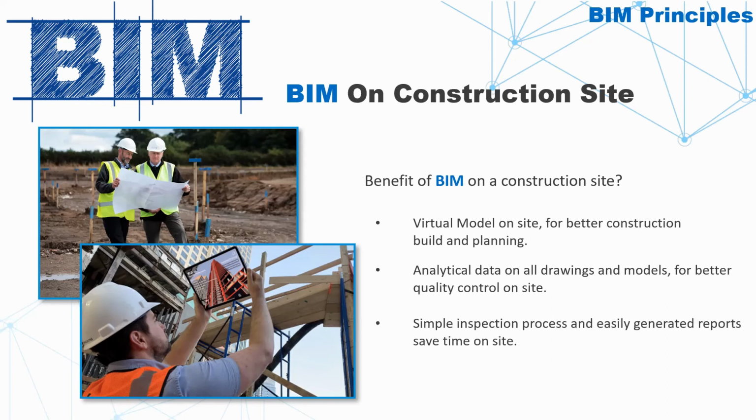And then thirdly, because we are using the common data environment, we are able to build templates that the whole team can use for their site inspections, whether it's safety checks, commissioning elements, quality controls that are being built for, we can now track these snags on site. These templates lessen the time frame to generate reports, because the idea is once I've snagged the item, the report needs to be ready for me. So instead of me manually collecting and coordinating the information, my common data environment is doing it for me.